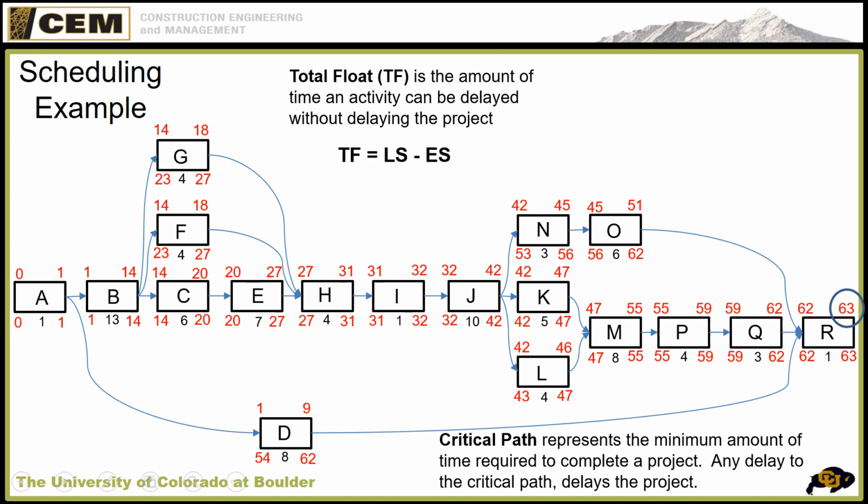So the super critical, extremely difficult equation is total float equals late start minus early start. So late start minus early start. You could also do late finish minus early finish. Okay, so total float is really important.